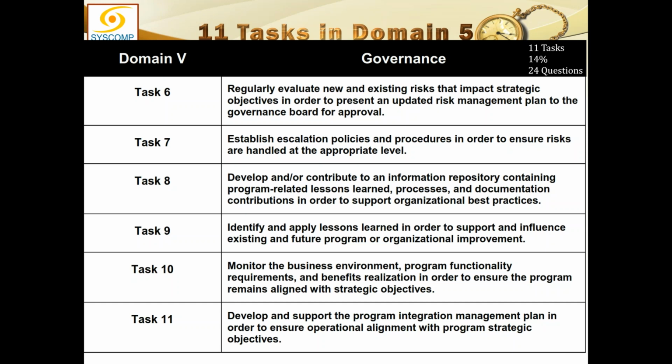So regularly you keep identifying the risks and evaluating the existing risks. This is a continuous process which keeps happening throughout the life of the program. And what we are looking at are risks that impact the strategic objectives, in order to present an updated risk management plan to the governance board for approval.